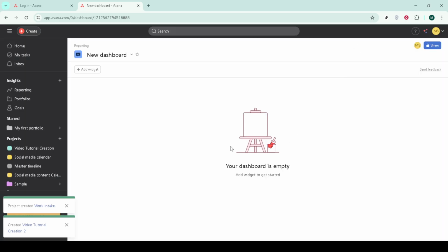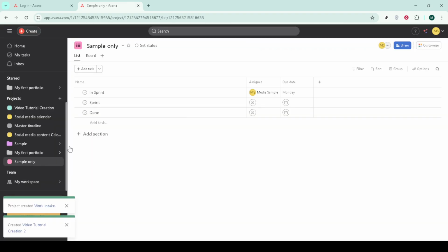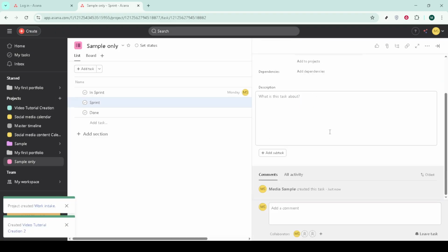As the sprint runs, manage work visually. Team members move tasks across columns, update fields like scrum stage, and keep comments and attachments in the task so context isn't scattered. Use the sprint number and story points fields to keep an eye on load and progress in stand-ups. Automate where you can.